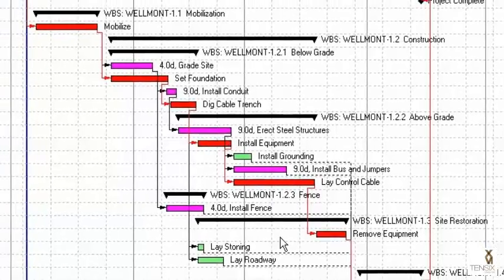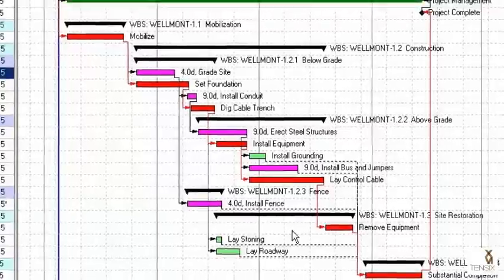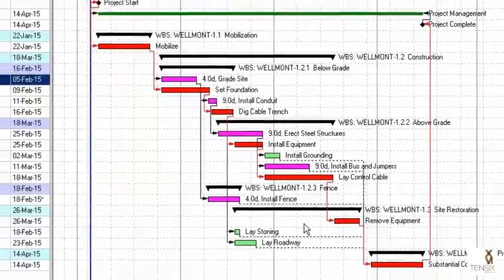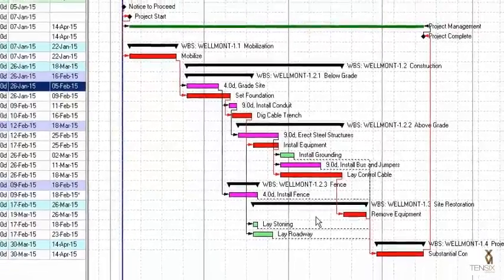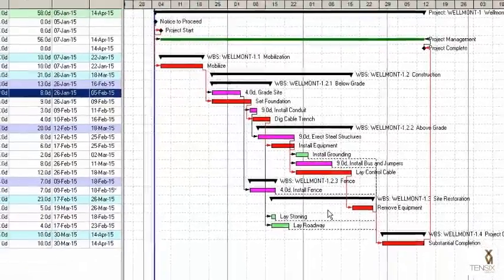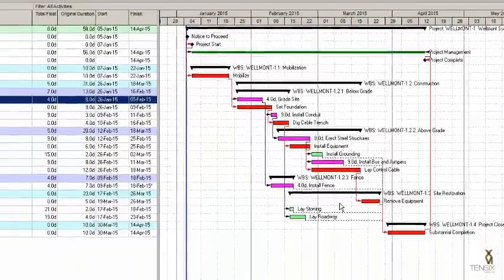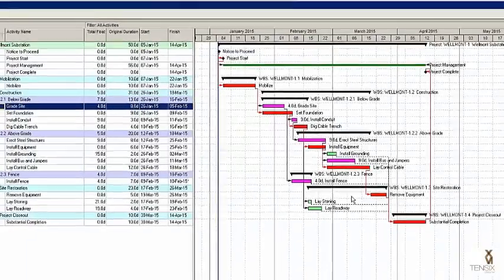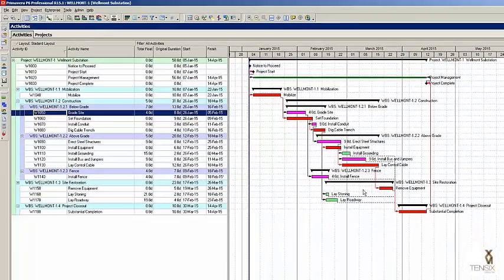There you have it. This is how to create a near critical bar so you can view the near critical activities on the Gantt chart. You can also view the actual value on the Gantt chart, which gives you more insight than just displaying a total float column in your activities view. Thank you.